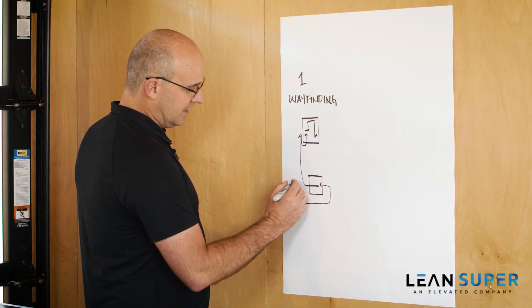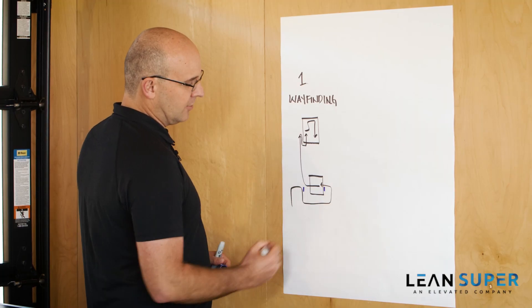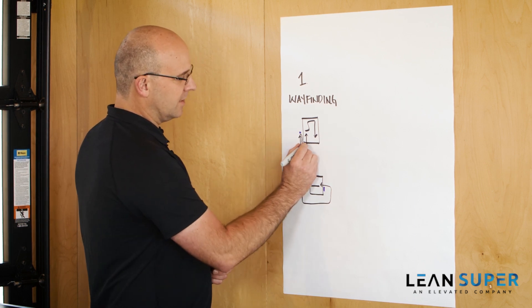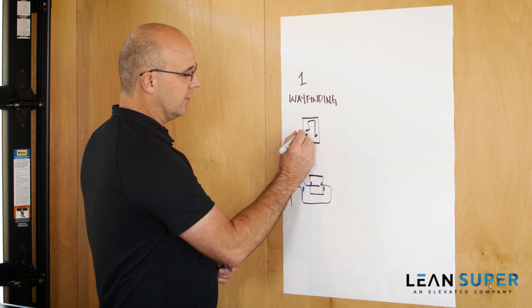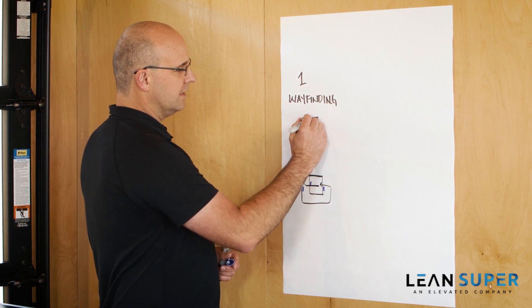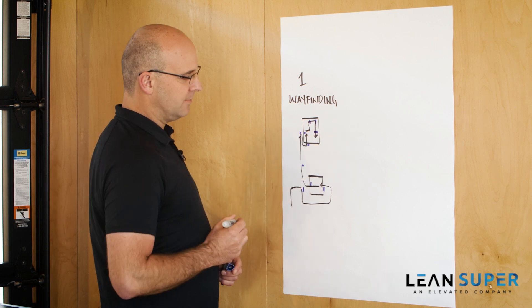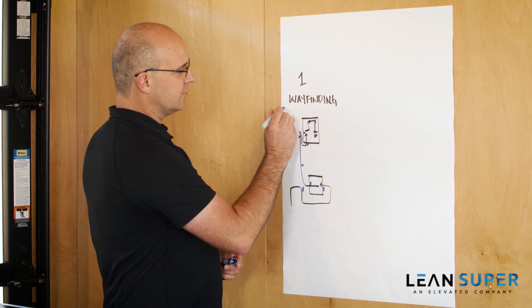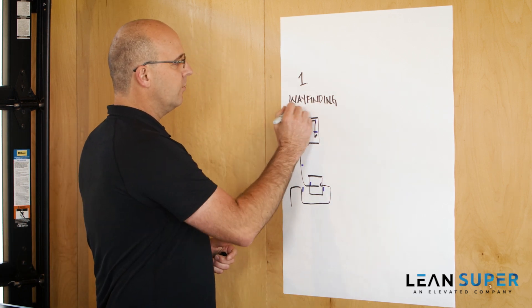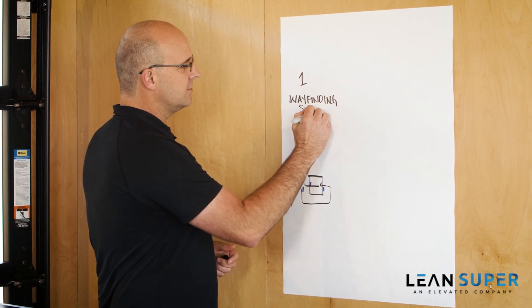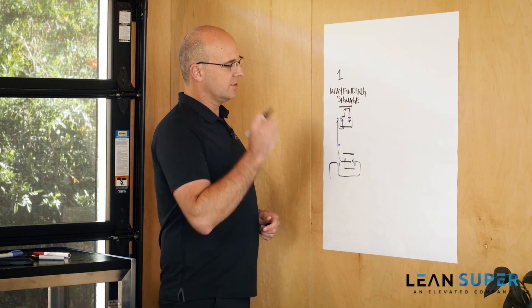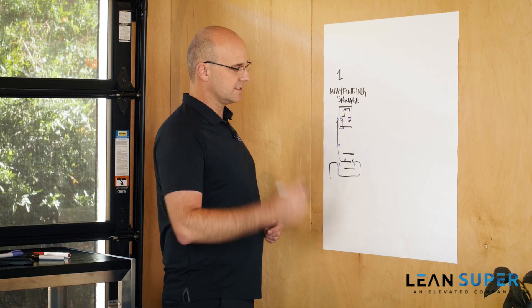Do I need signs saying this is where we go? Do I need signs that say this is where you enter the job site? Do I need signs that say PPE required? Do I need a sign that says worker orientation's here? Do I need signage here on the job site showing people where to go? So your first one that you'll start to coordinate is wayfinding signage for the project site so that workers can get to where they're going successfully.